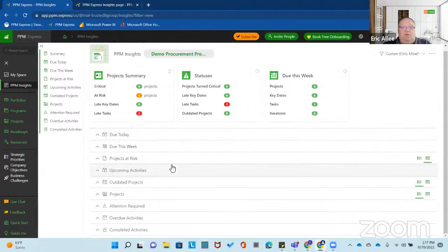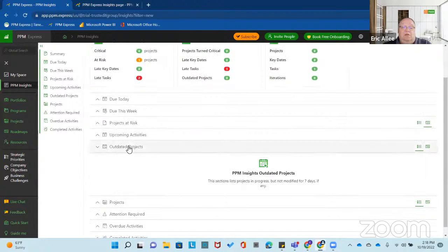The next one here we have is outdated projects. I talked a little bit about this one. This means that it just hasn't been updated within 7 days. No one has updated it within 7 days. So you would have that little icon I had up here that would be presented.